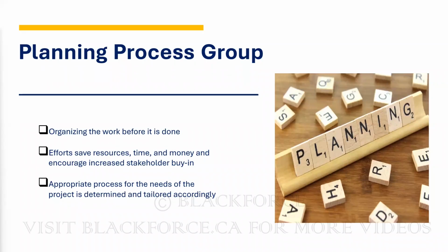So when we want to do hiring, sending out a job description, how much is it going to cost us, right? Who are the people that need to help us with this? Are we going to send it by email? Do we want to hire someone to do that? So you start putting cost to each of those lines. When you do that, at the end of the day, you will be able to sum up and know what your budget will be on that project, right? You'll be able to sum it up and say, this is what it comes to.